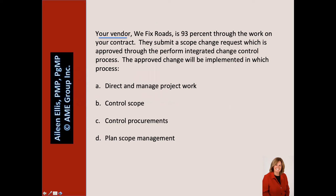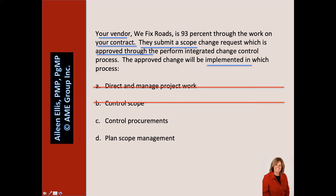When I read the question, we're working with our vendor, and they submit a change request that gets approved. The question asks where does their change request get implemented? Many of us wrongly will jump right to answer A, Direct and Manage Project Work. The question is implying, though it's not clearly stated, that the change request is related to the contract that we have in place with our vendor. Therefore, that change request that's been approved doesn't get implemented through Direct and Manage Project Work, not Control Scope — it gets implemented through the process Control Procurements.